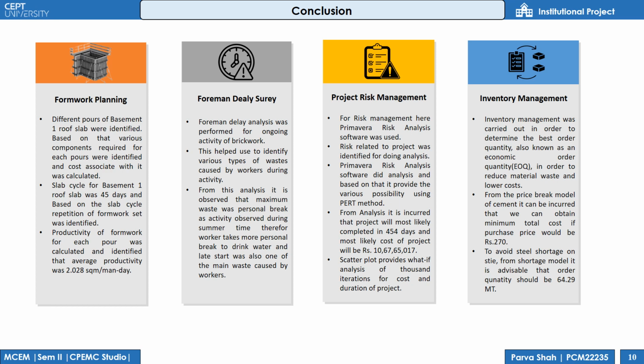Project risk management. Risk analysis is done to identify various risks related to our project and its mitigation so that it helps to determine contingency and risk response plan for our project. Primavera risk analysis software, which is used here for risk analysis, provides various possibilities using PERT method.